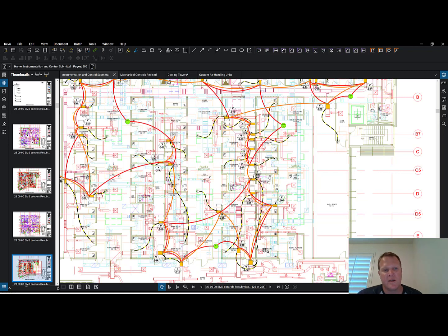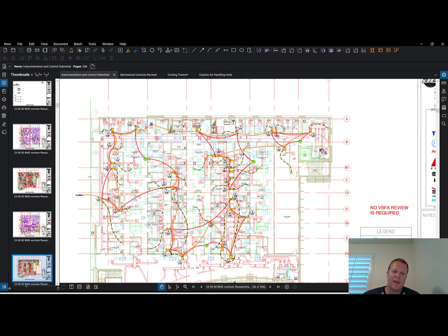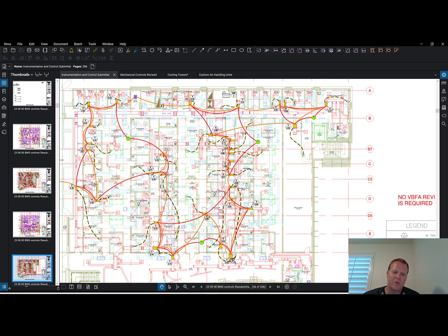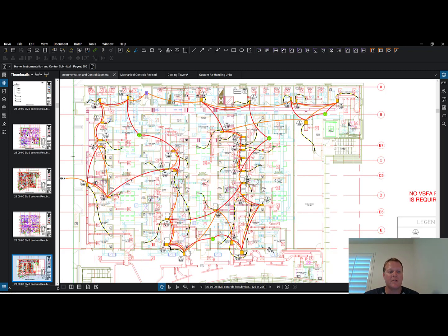My point is there is a lot of work to be done. From a contract standpoint, you already saw the submittal standpoint. Now, from a scheduling standpoint, there's a lot of work to be done. And notice that everything is sort of connected, right? So how much programming time does the controls contractor need after the wire is pulled, after power is on, after things are started to do programming? It's a big deal. So at the end of the job, when can you actually have lighting and power to all this stuff? When can you actually run it?